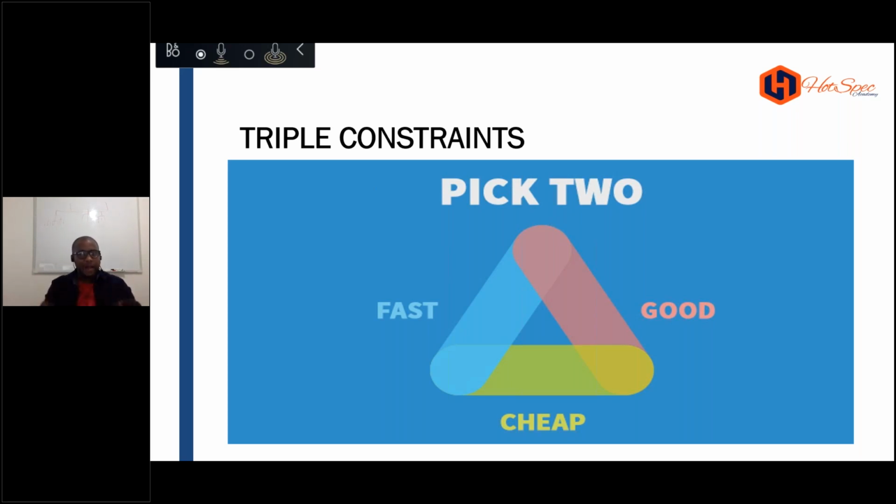As a project manager, the only thing I'm going to ask you is how much is our budget on this? When you tell me the budget, I'm going to scale that out and draw up a plan based on our budget and when you want it finished. You see how a plan works. You draw up your plan based on the information you're given. We want it by this date. This is the amount of money we have, so we can only hire these people. So you set your tasks to be finished on the date they've given you. You set your resources and the cost against each resource based on the budget you're given.